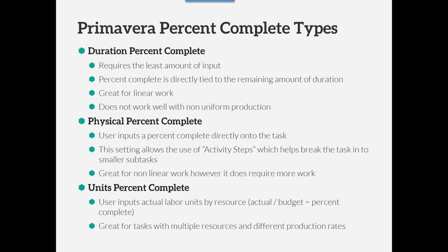And that's really where units percent complete comes into play, where users can actually input all the different actual labor units by resources. And this works really great too if you've got multiple disciplines on a particular task. And so it really does well with non-uniform production. And again, from a resource perspective, being able to validate with quantities and different metrics, we see units